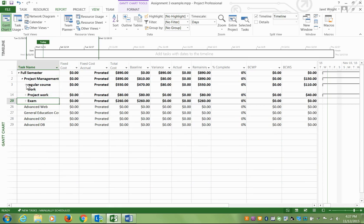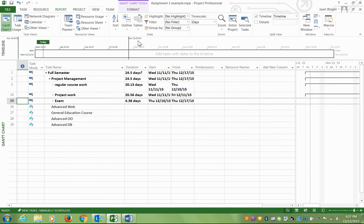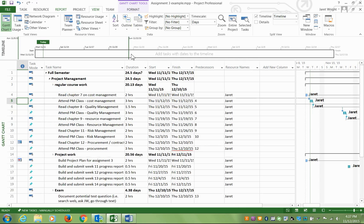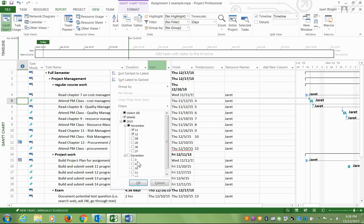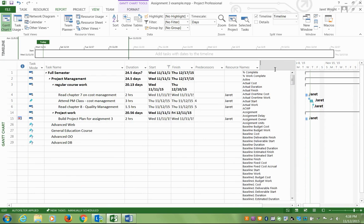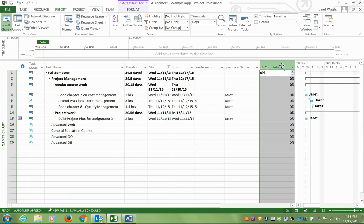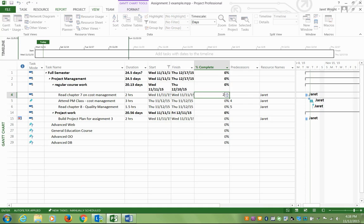As we go through the course, your weekly report, here's what you're going to do each week. Let's do outline, show all subtasks. Each week, what I want you to do is go up to this start column here. I'm going to do the drop-down. And I'm going to look at all the tasks that should have started. So today is November the 12th, so everything that should have started by November the 12th. And this shows me all the tasks here that should have started.